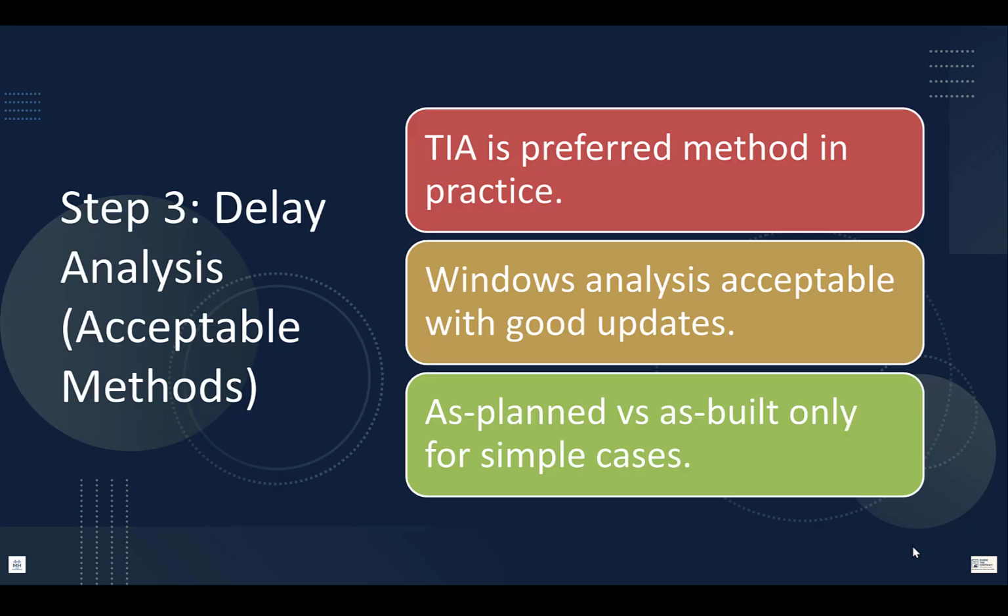I must stress that FIDIC 2017 does not mandate any particular delay analysis method. In practice, decision makers often give greater weight to methods that rely on contemporaneous programs and records, commonly time impact analysis, where suitable, or contemporaneous windows analysis, provided the method is transparently applied and supported by reliable updates and records. This method is used heavily in mega projects. I have seen it prescribed in many of the modified contracts for mega projects.